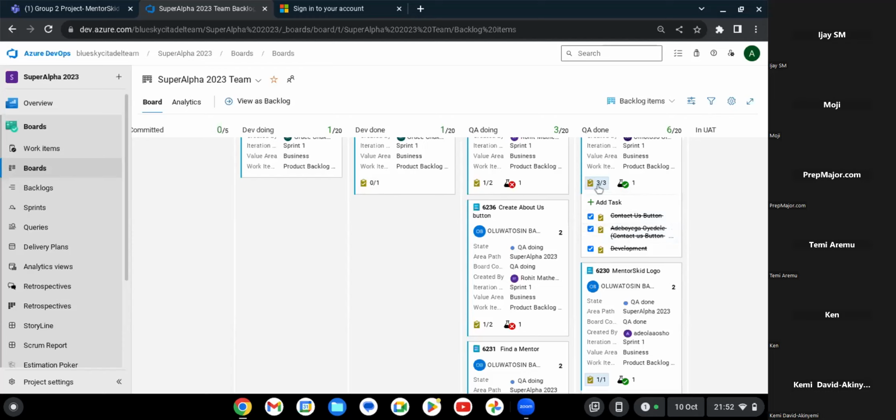Okay. And I was actually going to mention Azure DevOps earlier when Moji was talking about the velocity part, when he says you take it to another sprint, something that still shows green. Sorry, Jira will never allow that. Jira will ensure you close everything before you move to the next sprint. So that's one of the goodies of Jira, in the spirit of arguing Jira and Azure DevOps. I'm just kidding. Sorry, this war between Jira and Azure DevOps. I rest my case. Jira cannot let you proceed if you don't close your sprint and start again. Azure DevOps is better if you like to argue with your pencil, argue with your erasers.